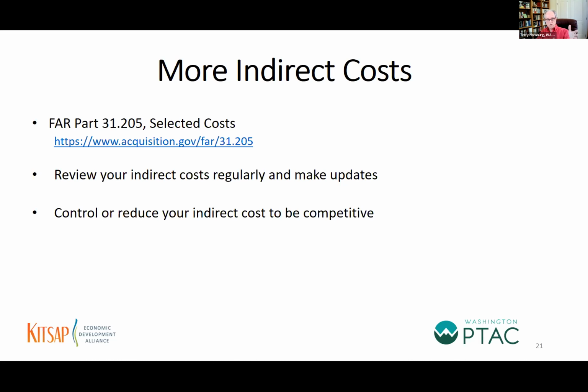The Federal Acquisition Regulations do not allow the cost for personal private use of a company's vehicle by employees. The only portion that can be allowed is the use of the pickup on site.